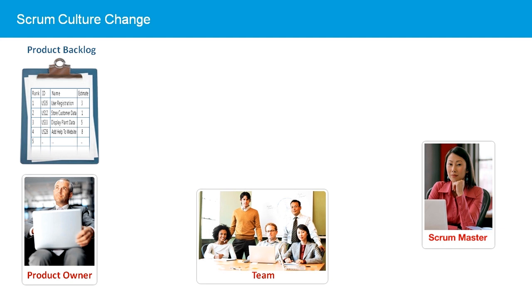This is facilitated by the prioritized product backlog, which is owned by the product owner and can only have one item at the highest priority. The product owner meets with the stakeholders, collecting and prioritizing their requirements and shielding the team from distraction.